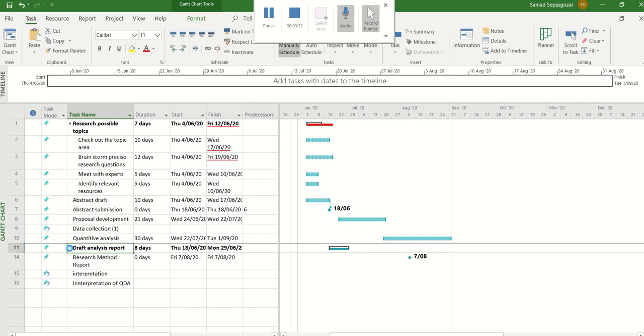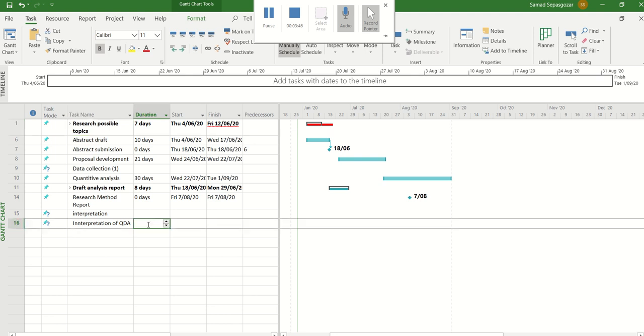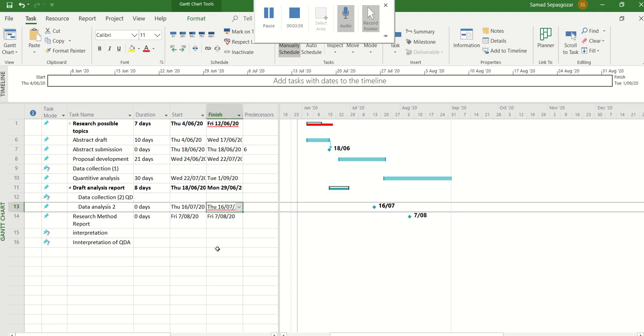Okay, so now click on the finish or start date. For example, here for the interpretation, if you want to start at this stage, start the interpretation of your data. You need to see where the data collection will be finished or the data analysis will be finished. This is much more relevant, so you just copy this and then paste in this field.